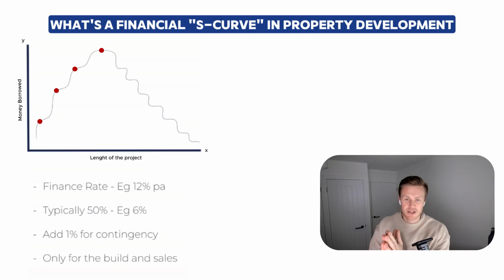And the way that I like to explain this, and how I explained it to Tom, is if this was a solid bit of something and you melted it down, it would fill that graph linear halfway across the curve, which is basically why we take an estimate of 50% of the finance costs. So it's basically showing that the half of the finance cost is where it's at.